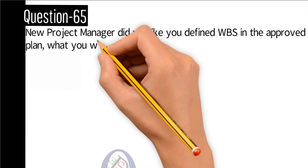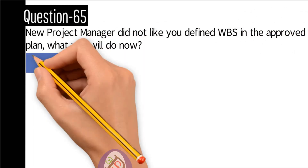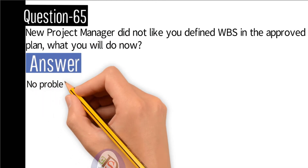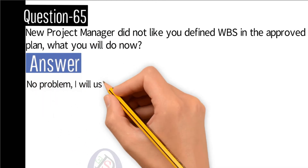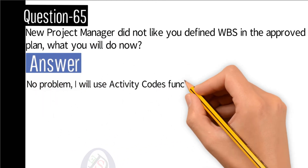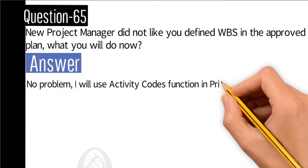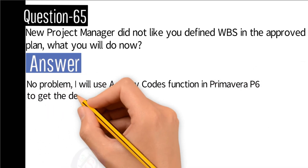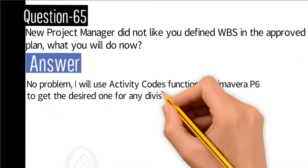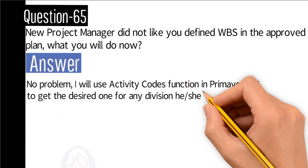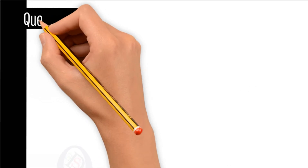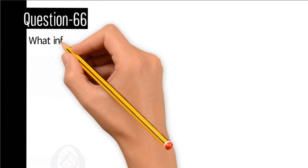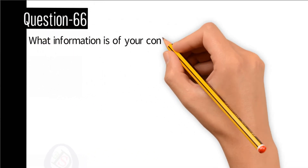Question number 65: A new project manager did not like the WBS you defined in the approved plan — what will you do? Answer: No problem. I will use the activity code function in Primavera P6 to get the desired division that he or she prefers.